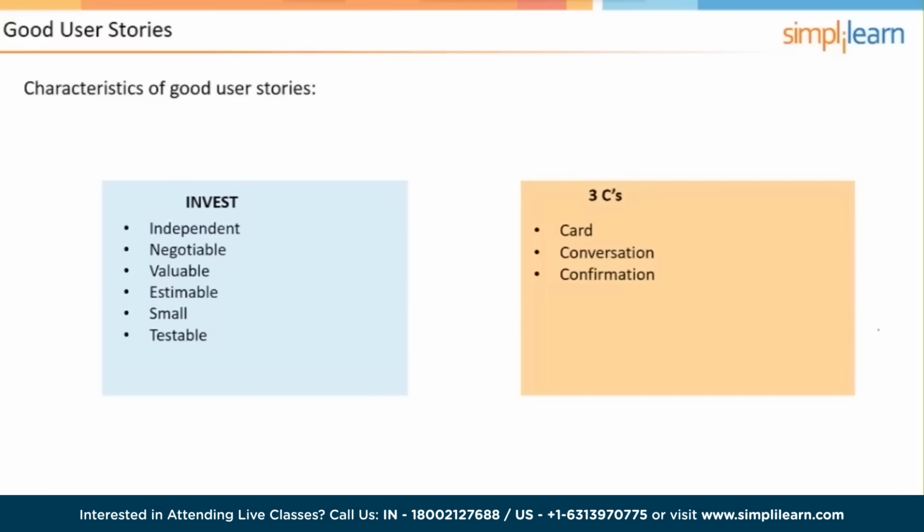The user story card is the item that is used for the team and the product owner to talk and discuss in order to make sure that the product owner and the team are on the same page when it comes to what is actually supposed to be developed and what it's supposed to look like at the end, which leads us to the third one, which is confirmation. Each user story essentially has to have acceptance tests in it itself. So card, 4x6, conversation, that's the starting point. That's where the team and the product owner discuss. And then eventually there will be acceptance tests included on the user story card in order to be used during the sprint review to assure that it's acceptable, that there's confirmation.